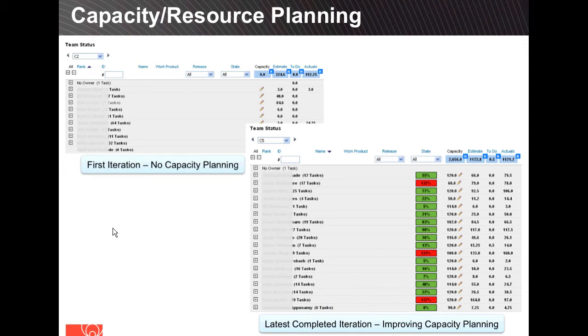So we took our first commitment, we tasked those stories as we estimated them. People took ownership of those tasks, and now we're comparing it against our actual capacity. So if I was looking down this list, and this is a column of red, I would say, you're kidding. You're not going to be able to make that kind of a commitment. Whereas in a case like this, there's a bit of a mix. We might rebalance some of the people who are committed. But it's really designed to help the team make that second level of commitment to the sprint.